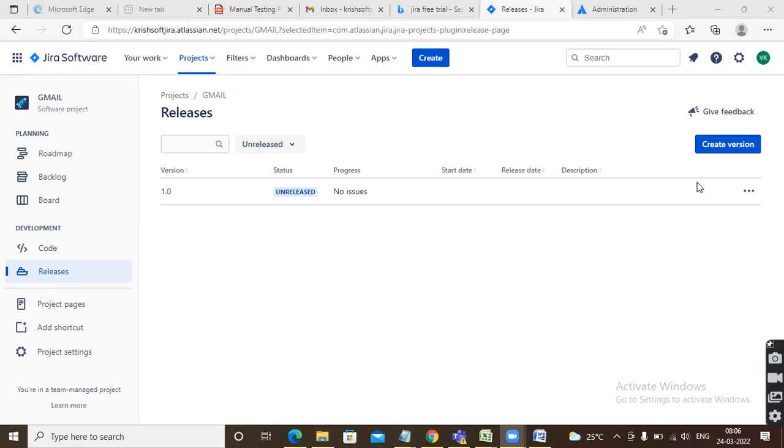The Scrum Master or product owner will create the list of stories, and the product owner will prioritize it. Those user stories will be created in the JIRA tool by the Scrum Master. That is how it will be, guys. Usually, an epic, which is a high-level requirement, is nothing but an epic. From the epic, we are going to derive the stories.